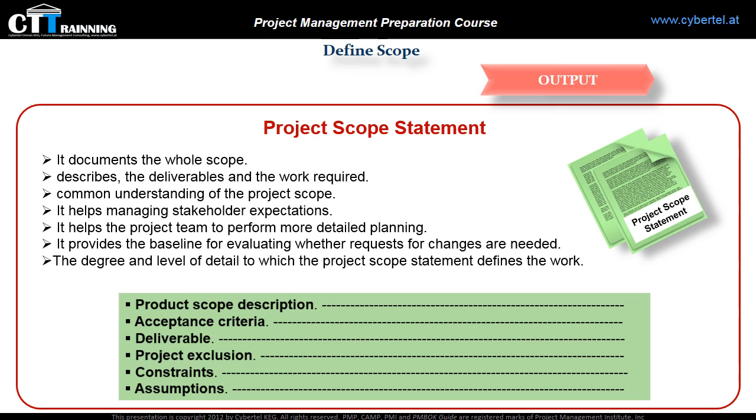Assumptions. Those are points of consideration during the planning process. Things that may happen or not. They could be true, real, or certain, without proof or demonstration. Also, we should describe the impact of these assumptions if they occur. Project teams frequently validate assumptions as part of their planning process. We may include this information in the project scope statement or in a separate log.